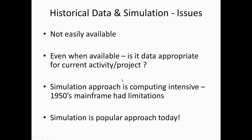But now today computing has come out of the limitations which we had in the 50s, and more and more simulation is becoming a very popular approach. Most of the tools, the popular scheduling tools we use, whether MS Project or Primavera, will have a simulation engine also to be able to model the uncertainty and risk. But it is not widely practiced. Only some of the leading companies are starting to use simulation-based schedules for uncertainty modeling and risk analysis, primarily because getting data is challenging. You could go with expert data and simulation also, but again the simulation technique is also quite a bit more complex than the CPM. And as we discussed, CPM itself is - people are finding it a challenge to use it properly. So it is going to take some more time before simulation becomes mainstream in our construction projects.